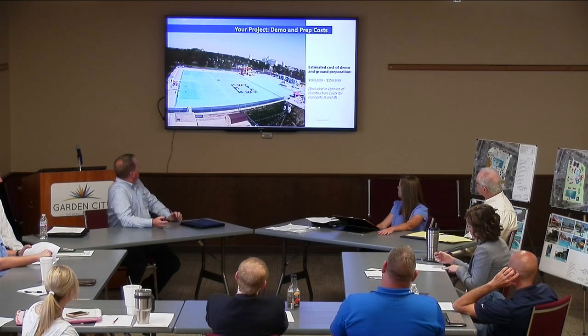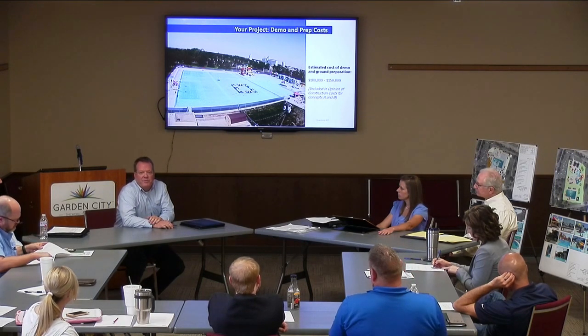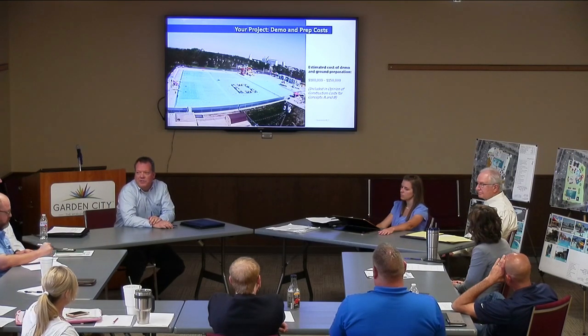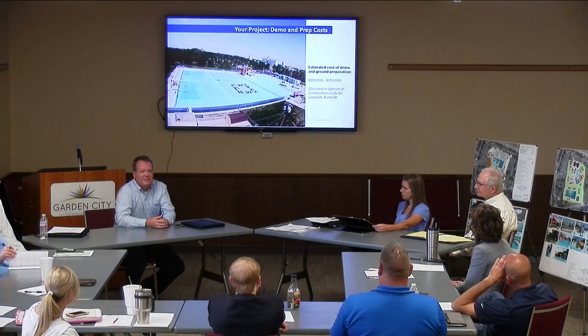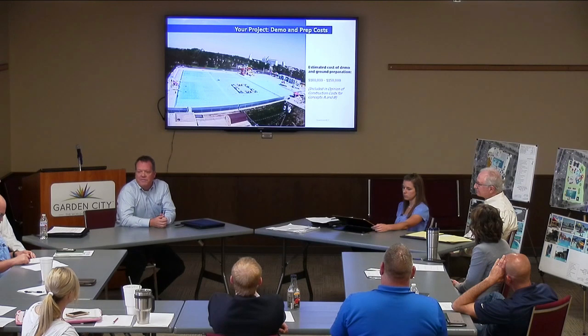So demo and prep. We did factor in demo and prep costs into the budgeting we've done. Demo costs, I put roughly $150,000 in demoing the big pool. Demo's a little difficult to estimate because you guys have dealt with this when you have facilities demo. The range in what guys charge to do it is all over the board, because it's really based on their estimate of how much time they think they can plow through something. But I did include that much as the budget for that.